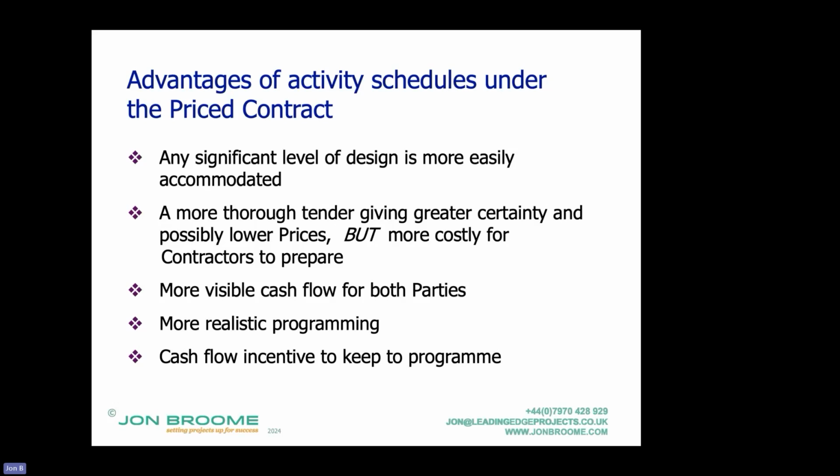Going back to my original example, if they had 3 months earth moving spread over 3 assessment dates, and they planned to complete a third, but they only completed 30% of the earth moving at the end of month 1, they'd get paid 30%.